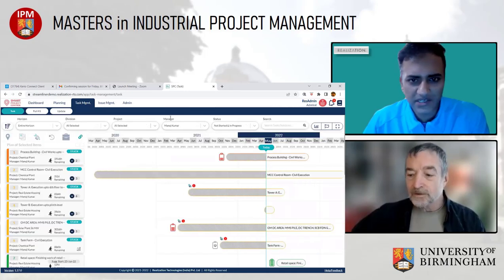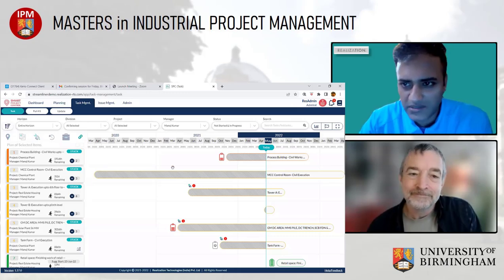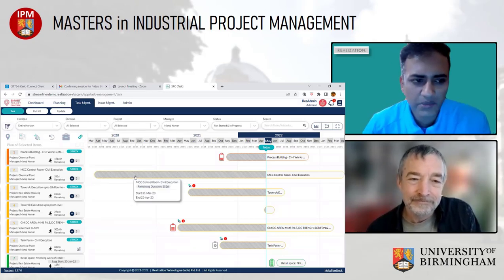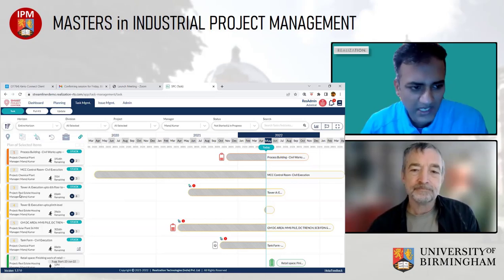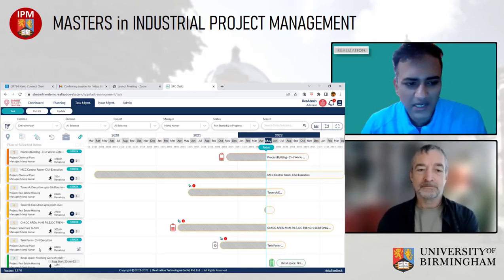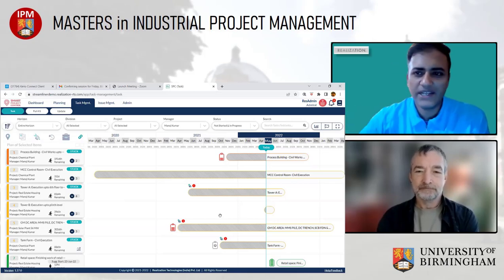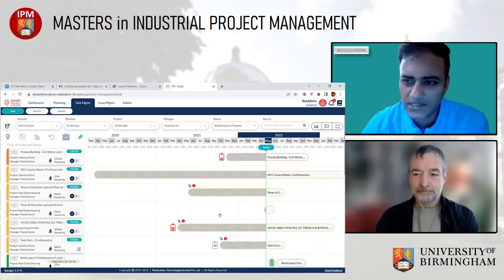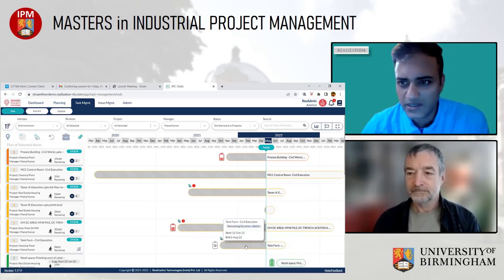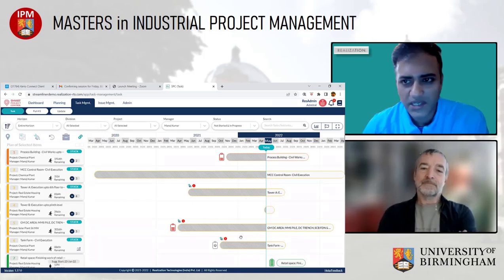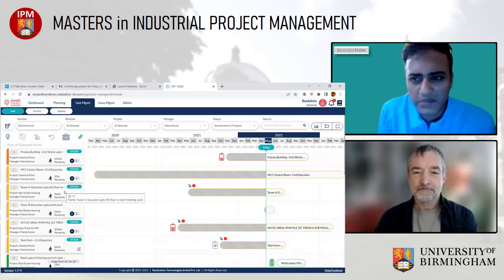So there is this one manager called Manoj Kumar who has been chosen, and this is his own screen. So he opens his screen. He is not working in one project. As you can see, he's got a project from process building. He's got a task from some other project, chemical plant, then real estate housing, then solar plant. So this person is the department head. He can see his entire portfolio and whatever task is coming to him. Good. So in that case, also they're prioritized across projects. So if he has to allocate resources, he knows where to do it. So it's not project specific, it's across project. So this is basically how we are communicating to the department heads.